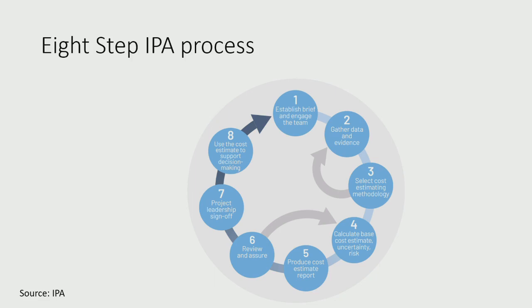So you can consider cost drivers at different levels of definition, at the high level of the project, the specification level, and also the work package level of the project plan. I mean, if you talk to somebody in Jaguar Land Rover, they will say, if we know the material cost of our design, we know it's about 50% of the vehicle cost as a rule of thumb, based on our experience of building JLRs.